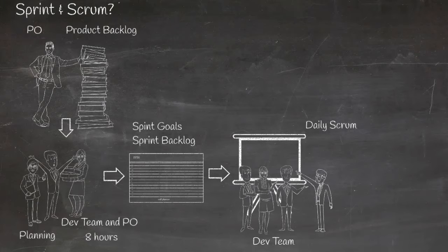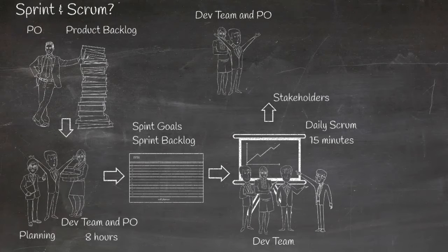Only these 3 questions must be discussed during the daily Scrum. For any additional questions, side, or in-depth discussions, separate meetings need to be scheduled. This meeting should last no more than 15 minutes. At the end of the daily Scrum, the team must have transparency about the current state of the sprint and about the next actions.